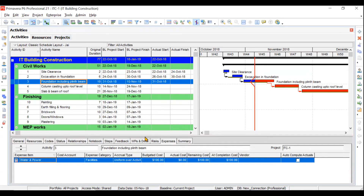Then we will move to expenses. We will have already added labor, material, staff, and plant and machinery, but if there are overheads or extra costs related to an activity, we update those in expenses. For example, I have added a cost of water and power worth 100 dollars.